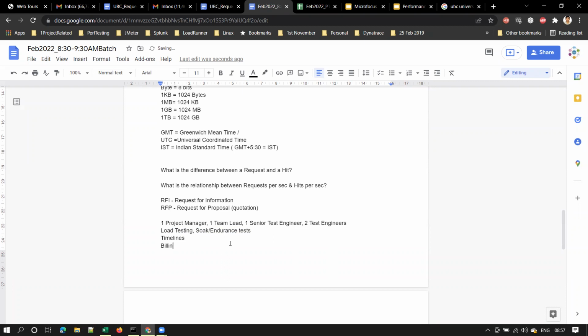And billing. Billing means how much do they charge for the project manager? How much for the team lead? How much for the senior test engineer? How much for junior test engineers? Again in billing, there will be fixed bid or T&M. There is something called time and material.